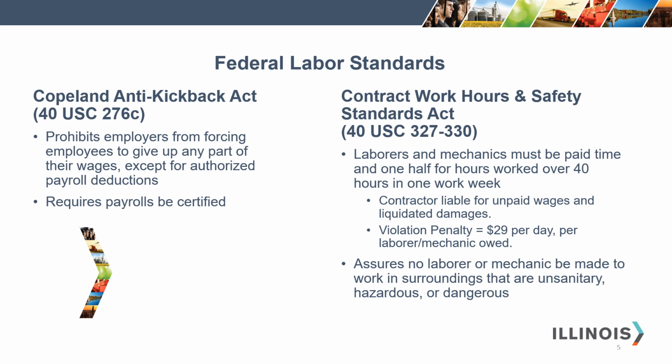Contractors are liable for unpaid wages and liquidated damages. The penalty for violations is $29 per day per laborer and mechanic owed. This is for willful violations and computation errors. So please make sure that you are reviewing those payrolls and catching the errors as quickly as you can.